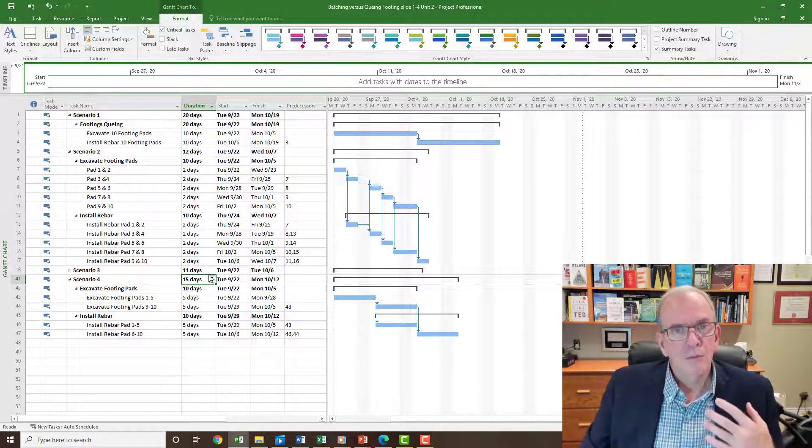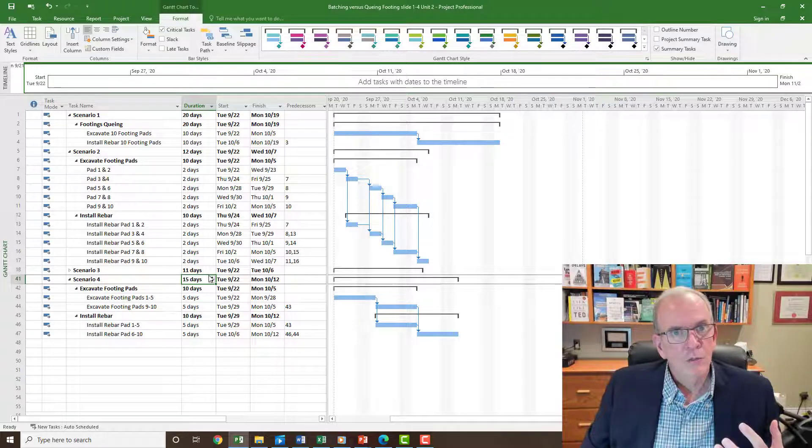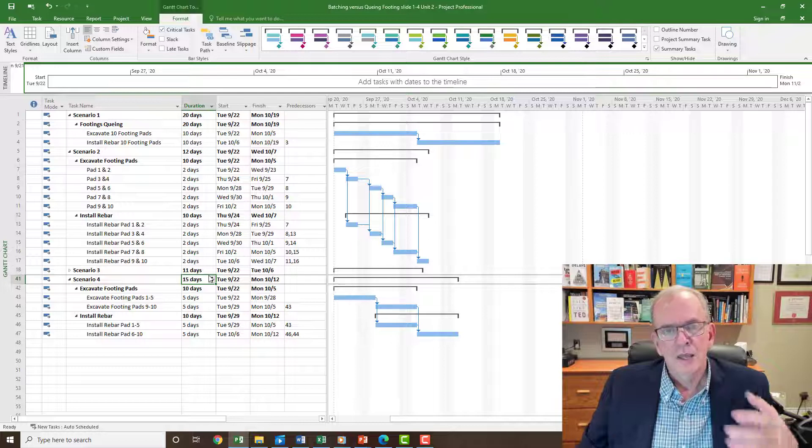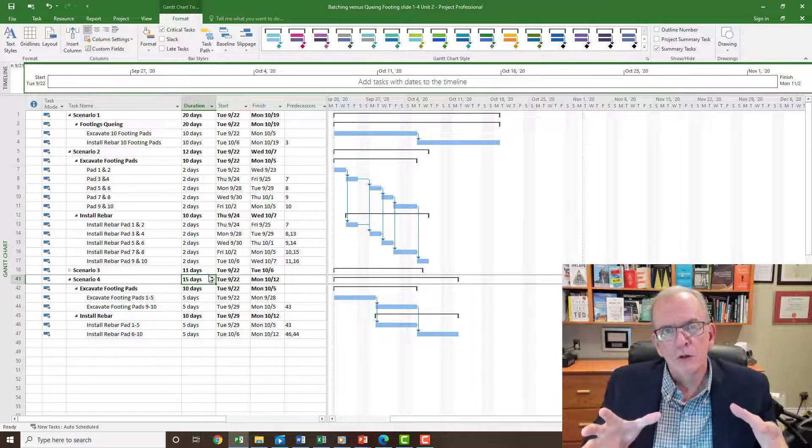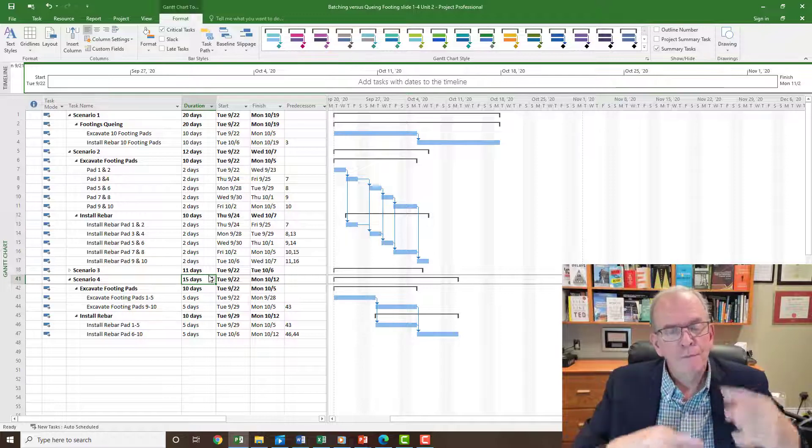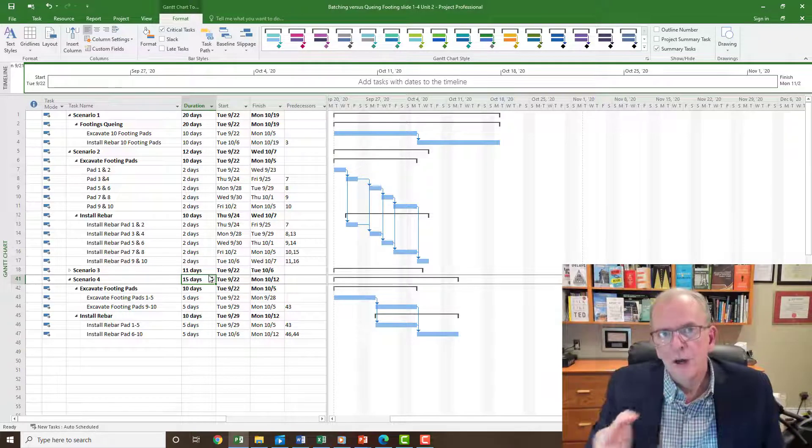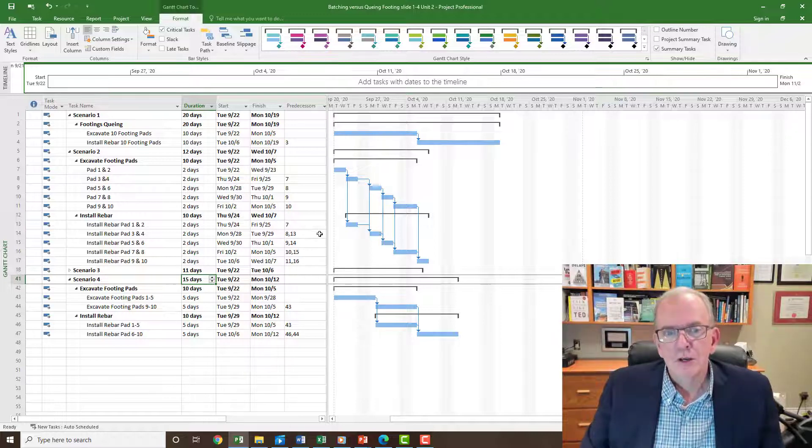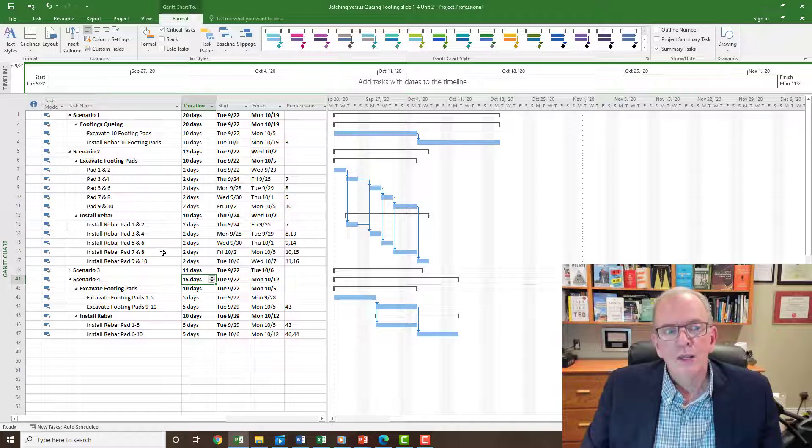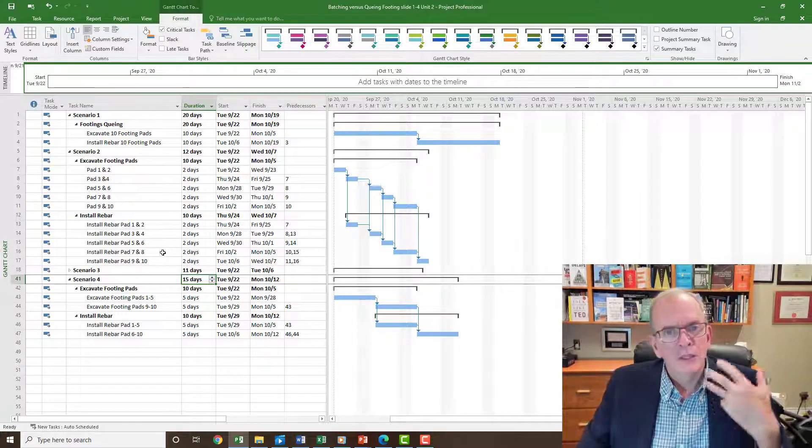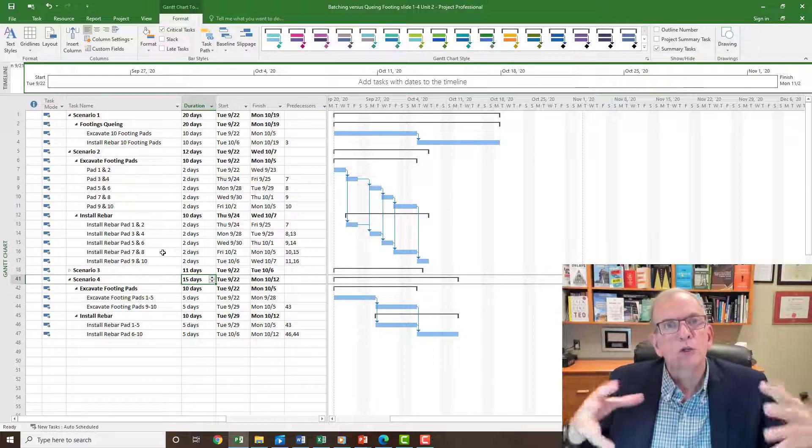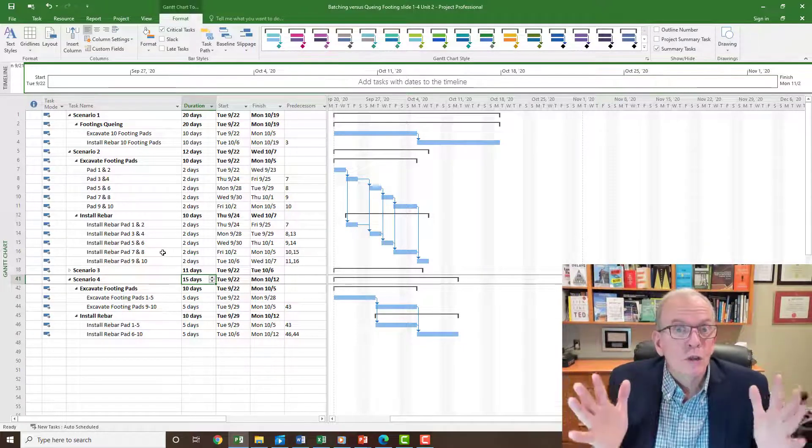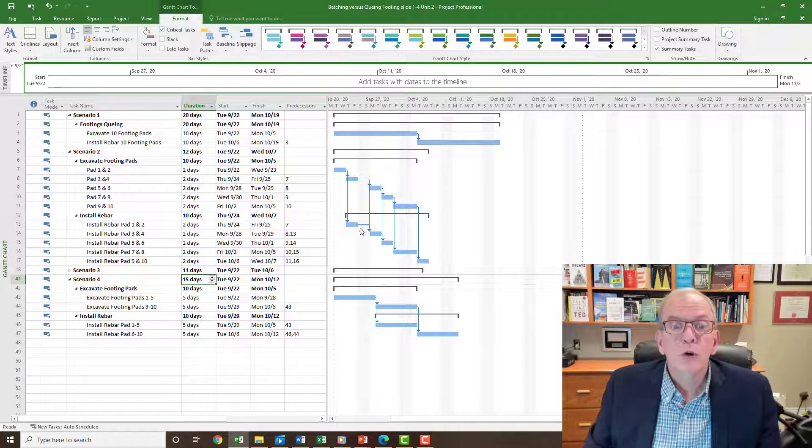So you really have to think about how many things you've got going on on your projects. Are you doing a whole floor of something before the next trade comes in? Can you break that up into smaller compartments, zones, smaller batches, have more feedback, have the project flow much more better? And scheduling software like Microsoft Project can be really helpful, just as you could see, running different scenarios and figuring out what's right for this area that you're wanting to reduce the batch size.